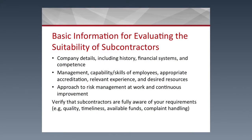When evaluating a subcontractor, you need basic information: the company profile, the financial system, competence, capabilities, the skills of the employees, appropriate accreditation — for example, if it's a laboratory — relevant experience, and desired resources. You must fully verify and be aware of the quality you want, the timelines, whether the subcontractor will comply, and the available funding.